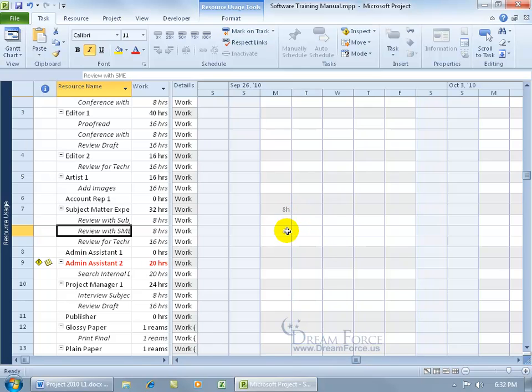And what day is he working his 8 hours on? His only 8 hours that he's been assigned to work on the task. Come up here, hover over, well, September the 27th. So when he's done, he's out of there. And then the task gets pushed out, delayed until obviously Writer 1 is available according to the resource leveling here that's been done to the Writer 1 resource.